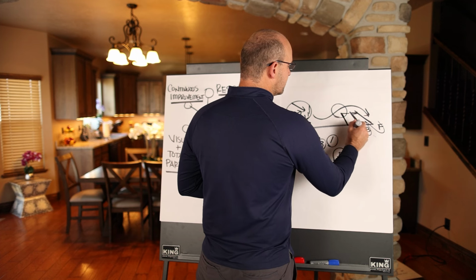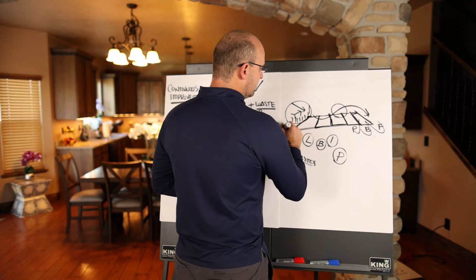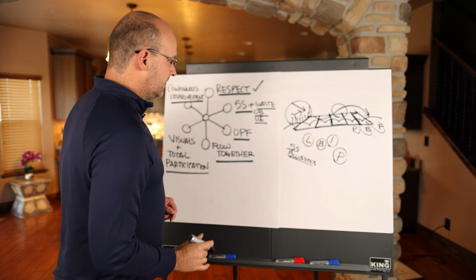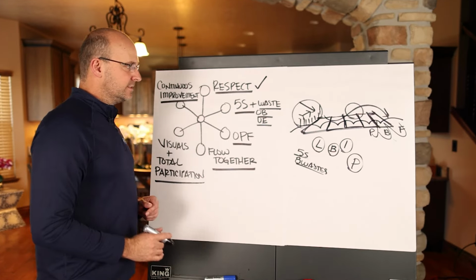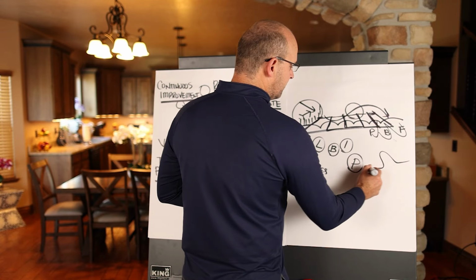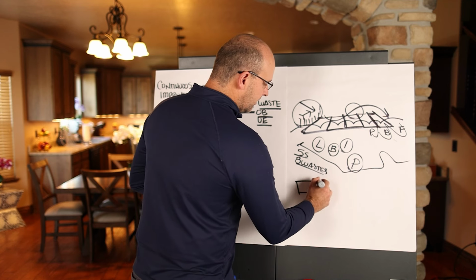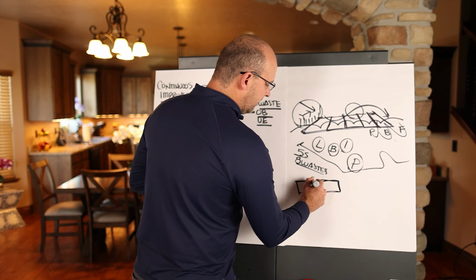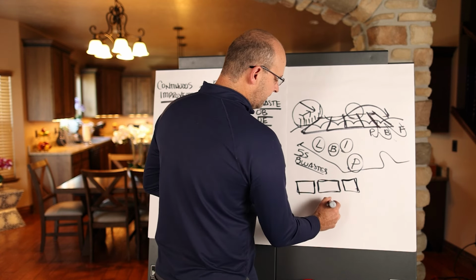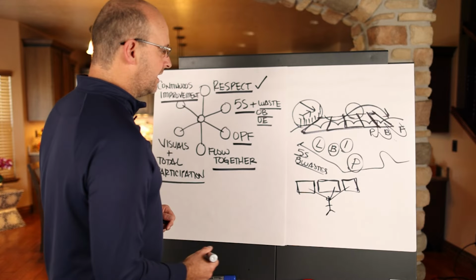Can you get all of your trades throughout the site flowing together from zone to zone to zone to zone together, going the same speed, the same distance apart? Visual systems. Can you, on the project site, do you have signage for where people should go? In your huddle areas, do you have nice visual boards for your plan, for your last planner huddles, for your KPIs and your metrics, so that everybody can literally see the plan, know the plan, and act together with you?